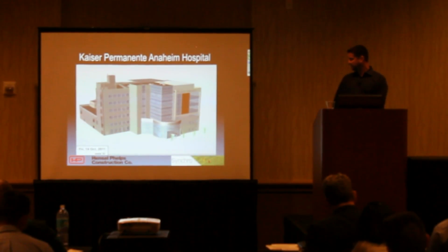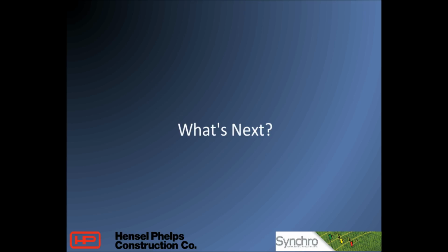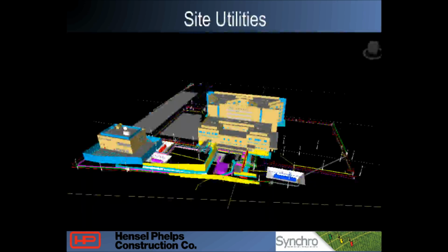So going back to some of the other lessons learned, that South Bay video that we were showing, make sure you're clear on what you're going to be utilizing. I wound up having one of the modelers detail out all of the shoring to go around for the excavation. You wound up spending about 6 hours detailing all of that out. And when we went down and made it in the video, it only wound up being about a second of the video. So you got to make sure that you clearly communicate what your needs are and what you're trying to show, so that you don't waste time on modeling stuff that's not going to be utilized. At the end of the day, it just wasn't necessary.